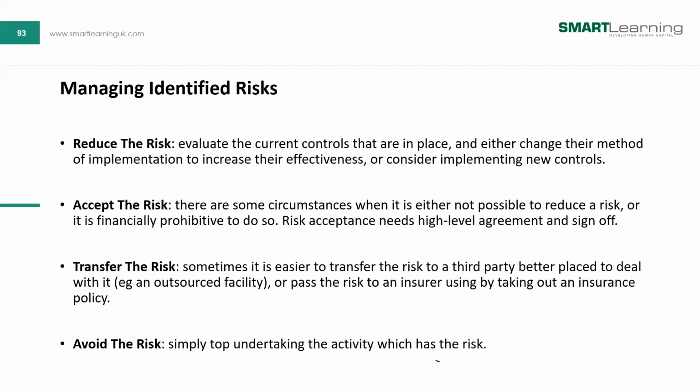Yep, so the ways of managing risks that have been identified from the risk assessment step. When you start from the risk identification, and you analyze and evaluate it, you are now managing the risk or selecting your risk treatment options. You can either reduce the risk, which means you evaluate the current controls that are in place and maybe suggest new controls, but you must have looked at existing controls first before suggesting, because risk management encourages cost-benefit risk management, or effective risk management as it's called. Don't throw away existing controls if they are effective.